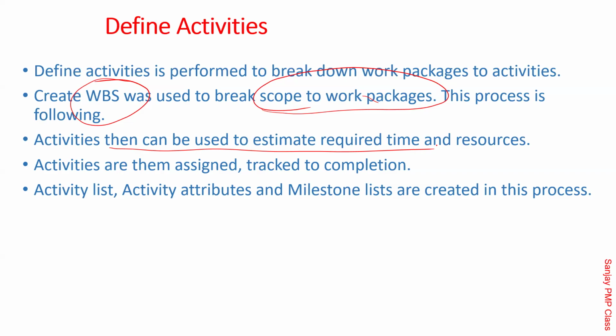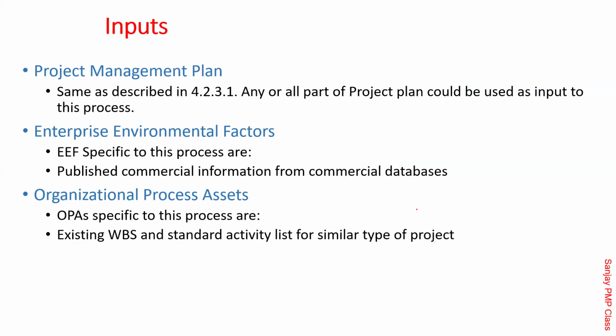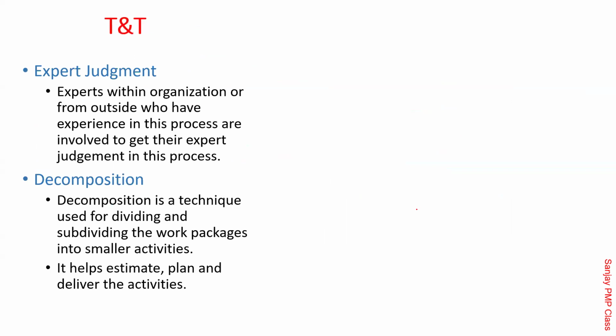That's why it is not done at the work package level, and this process is meant for that. The outputs of this are the activity list, activity attributes, and milestone list. So let's try to see. Inputs are well known to all of us. Decomposition is the common tool.